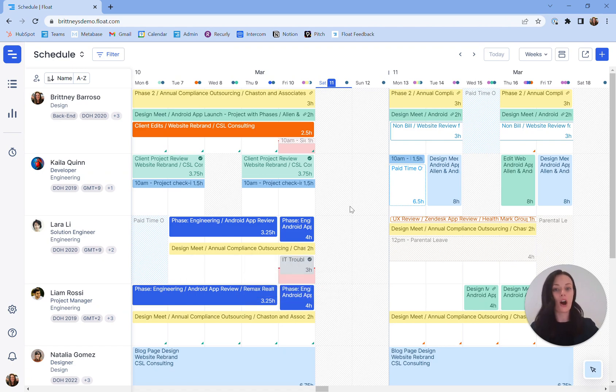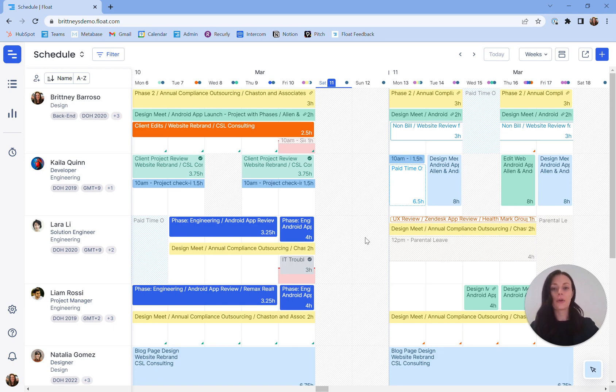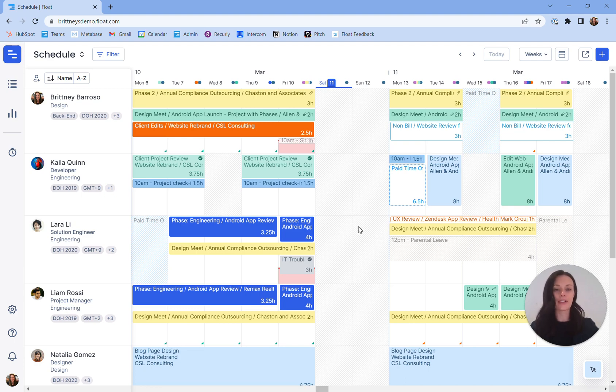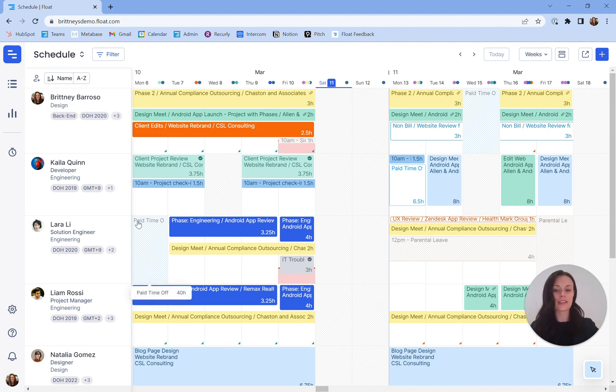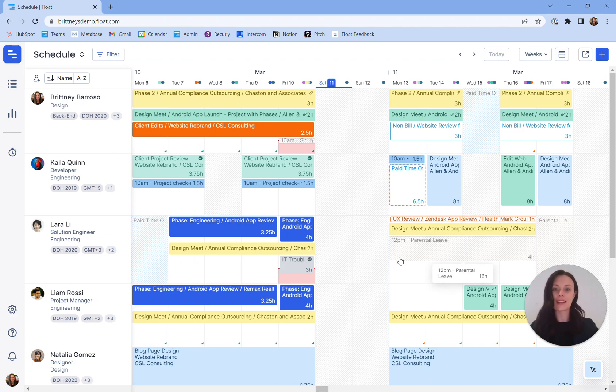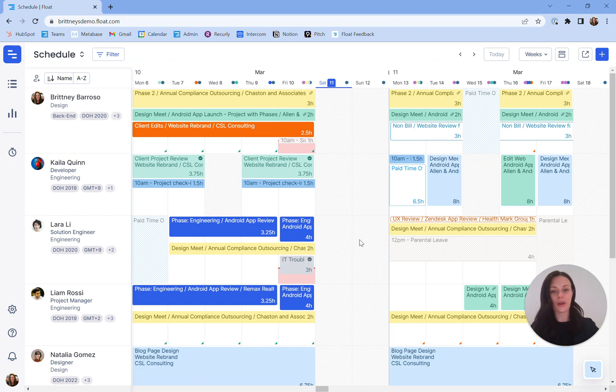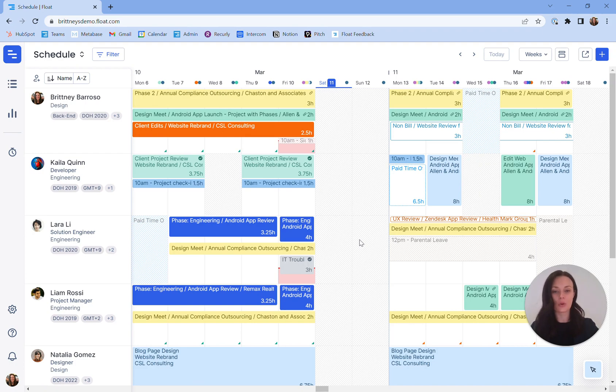All time off is marked on the schedule using diagonal lines to indicate this is a non-working period. Gray means consistent non-working hours, example here, Saturday and Sunday. And colored diagonal lines indicate different types of time off. Here we see paid time off. Or you could scroll over here to see parental leave. Quick tip, you can adjust your team's standard working hours via your team settings.